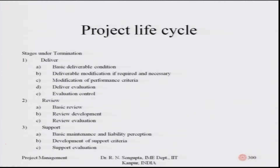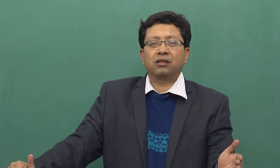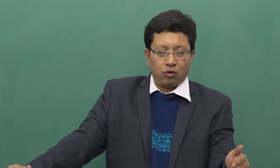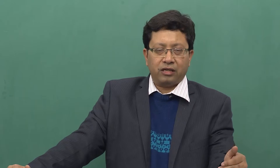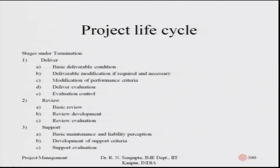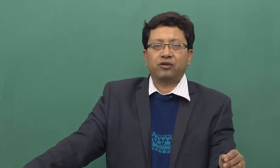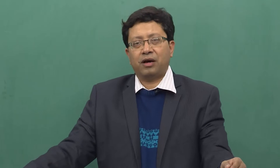After the consideration phase, you find out how your project ideas can be propagated with respect to practical things. Then you elaborate the concept — how it can be implemented, what variables are to be considered, the cost and time implications, whether it is technically feasible, and the social and environmental impact. Then you evaluate the concept with respect to all criteria and decide to end the conceptualization stage.